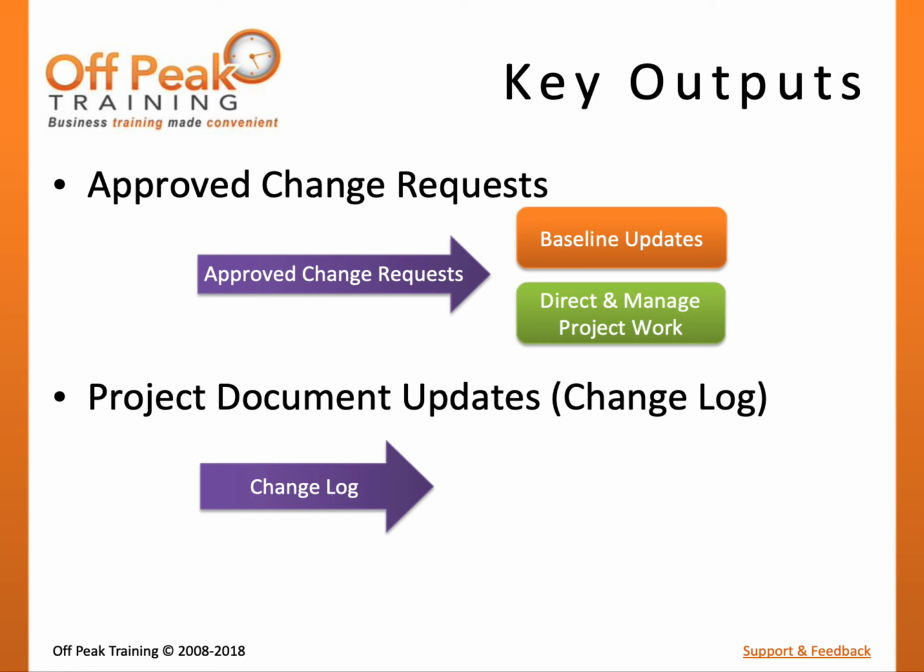It is important for all decisions, accepted or rejected, to be tracked throughout the project lifecycle. These historical records will be useful during lessons learned sessions and can be utilized in future projects. The change log is a project document that is used to track all change requests, their current status, and their anticipated impact to project objectives. When more formal change control is used, this might be automated within the project management information system.